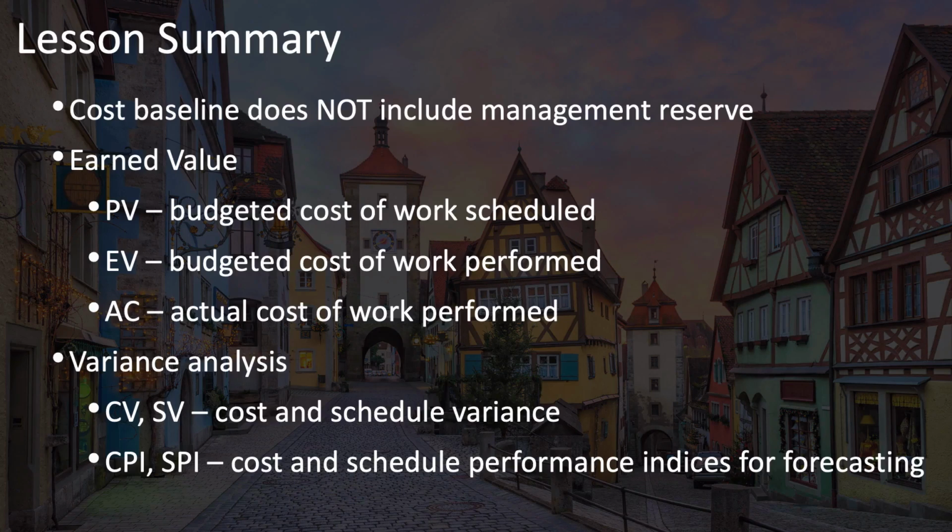A few key things to remember from the lesson include that the cost baseline does not include the management reserves, that the key earned value measurements that are the foundation of earned value are planned value, which is the budgeted cost of the work scheduled to be done, earned value, which is the budgeted cost of the work performed so far, and actual cost, which is the actual cost of the work actually performed so far.